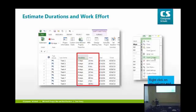There is actually a feature where Microsoft Project captures the WBS for you. If you go onto the Format ribbon, and then on the far right-hand side of the Format ribbon, you'll see the Outline Number checkbox. Check that, and it'll actually show you the 1, 1.1, 1.2, 1.3, 1.4, 5, and so on and so forth. It holds on to that, so you don't need to type numbers ever. That'll be a nice little tip there.